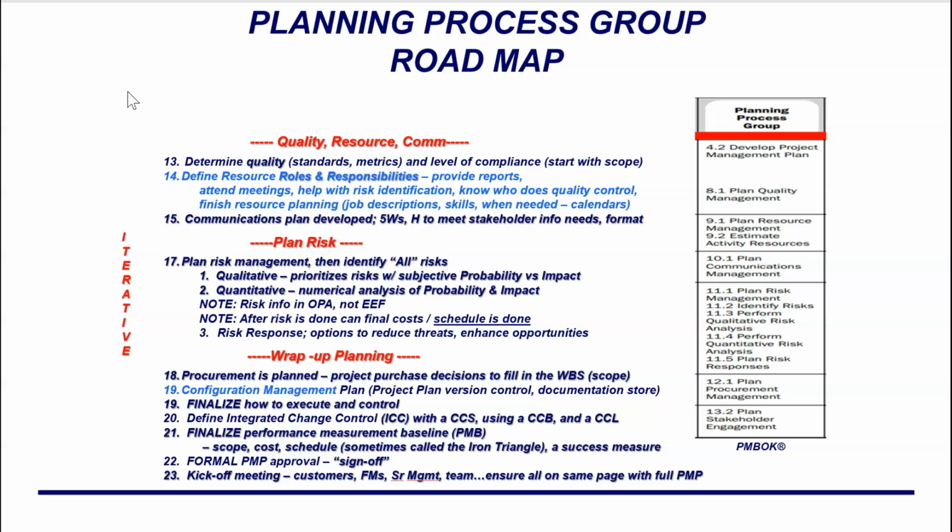Well, speaking of risk then, I want to identify all the risks and create a list. It's called a risk register. It's a list of the risks that I've identified. Then I will do qualitative analysis, which is just subjectively applying a score to them. And subjective can be good because it's by subject matter experts, so they know what they're talking about. It's not perfect. But the point of qualitative risk assessment is to take the risk register, that list of risks, and develop a prioritized order, right?